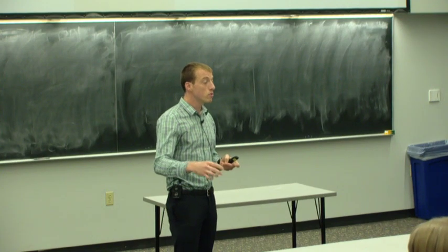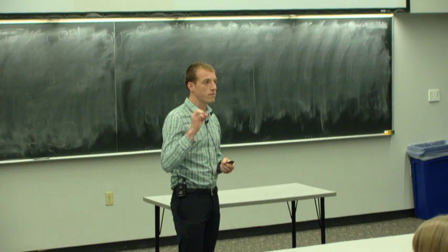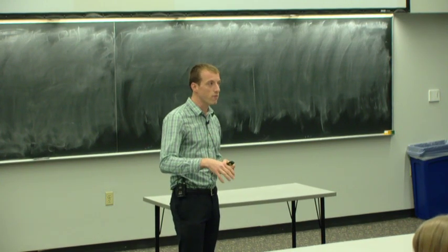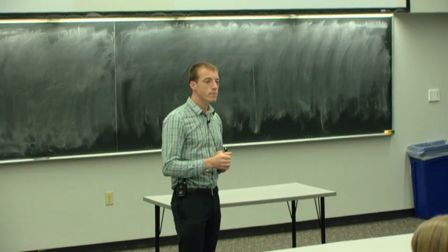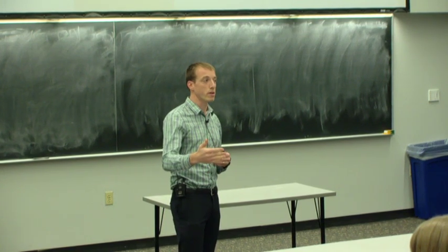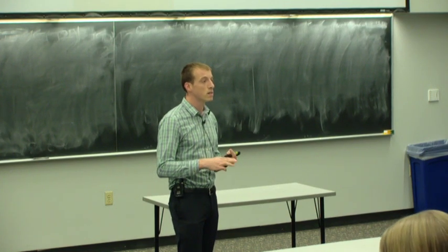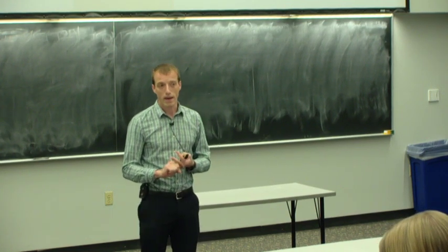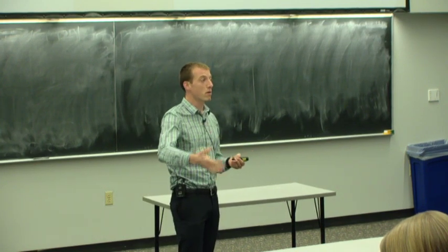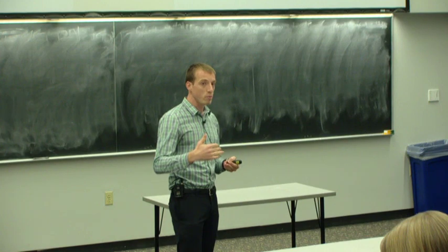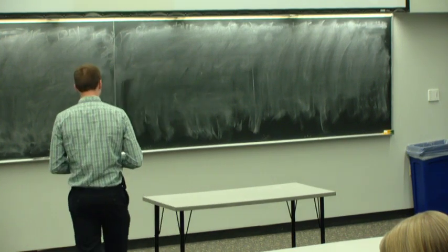And then you'll want to come up with measures to reduce that number and then get an updated number based on those. You usually won't be able to reduce the severity, okay? So if there's some risk that would cause the bridge to fall, that severity doesn't change because you did something else usually. But what you can do is drop the occurrence or the detection number so that you can be more likely to catch it or you make it less likely to happen, okay? So you may say, I'm going to add a reinforcing member to that bridge to drop the probability of that happening, okay? Does that make sense to everybody? So those are the numbers you're going to go through.